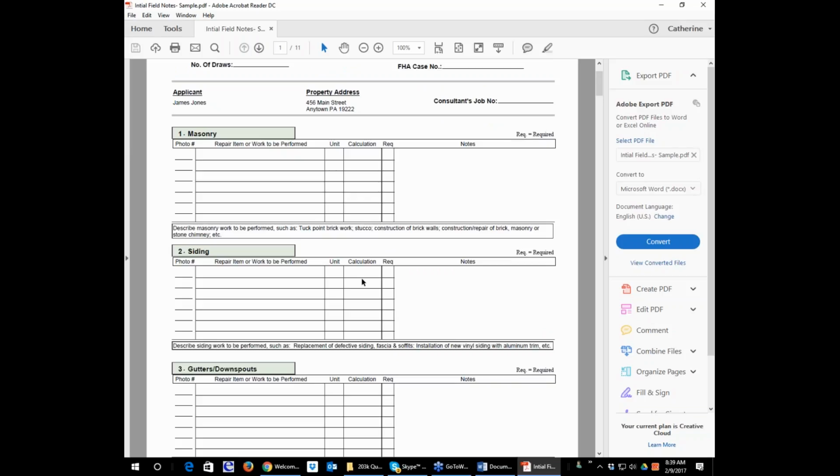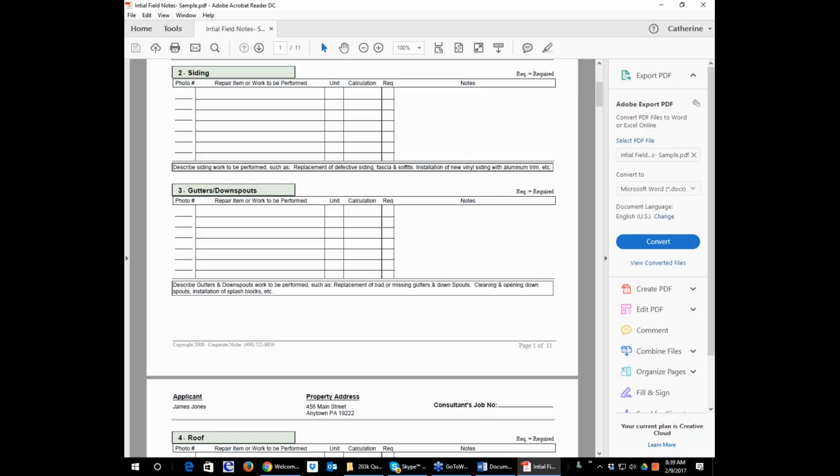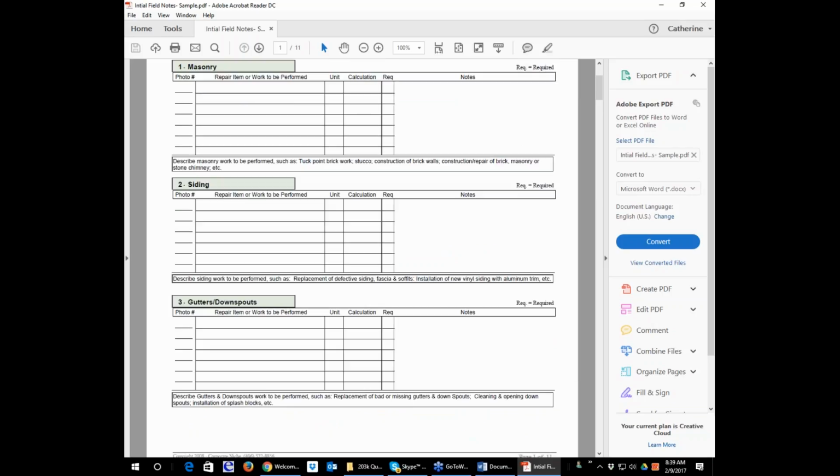If I do something in Genesis, it will not be broken down into the 35 categories. It will be broken down by room, by location, like bedroom 1. When I go out to a property now, I review it by location, and in each room I just talk into the recorder about what I have found and what needs to be done in that room.